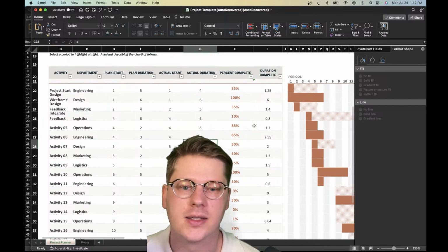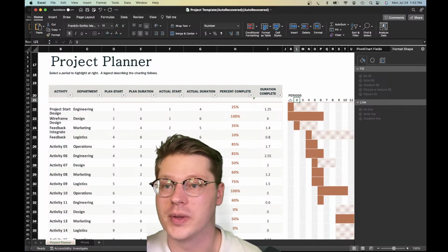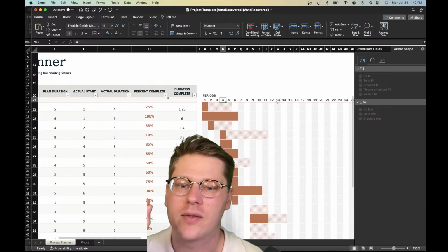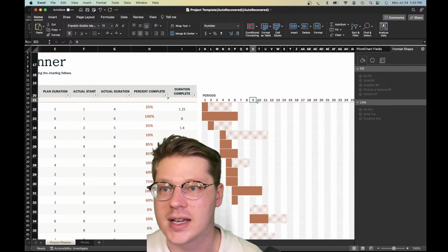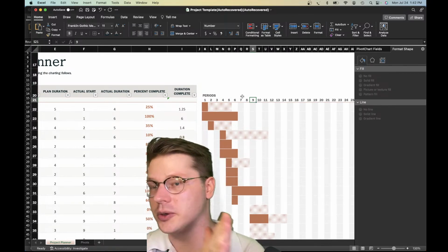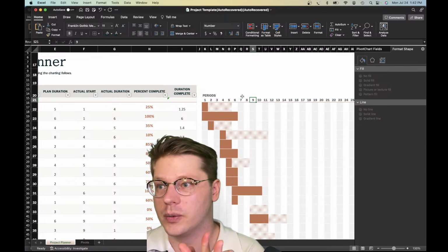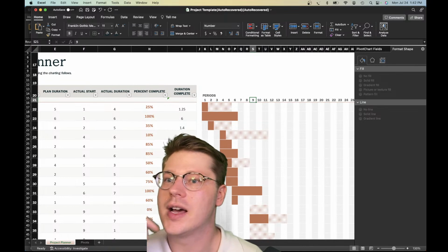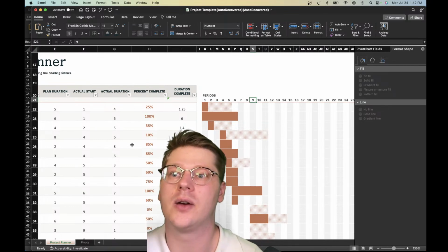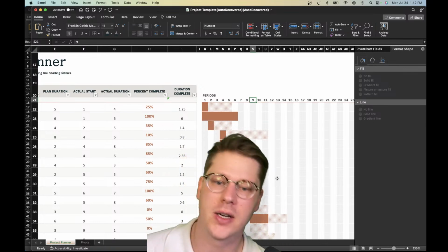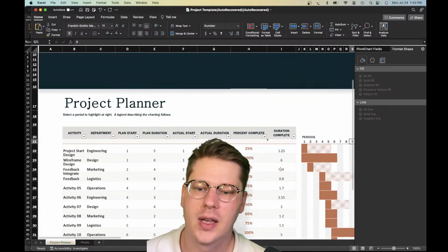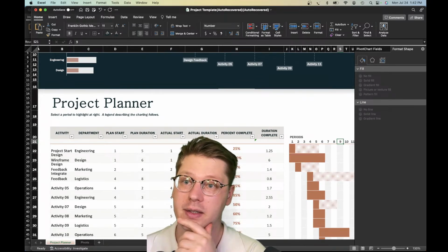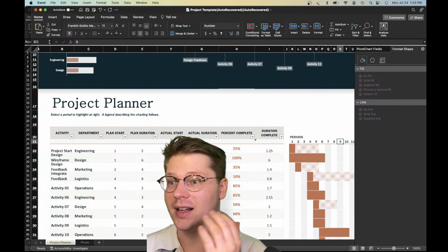The problem is this chart actually can't work with dates. And this is one of the issues with Gantt charts in Excel. We can't really have these periods be actual date periods tied into the chart. What they are is just sequential periods, starting whenever you want to whenever you want, but each one represents a certain period of time. So they're not actually the day itself, and if we use today, it wouldn't know where to put it in terms of the periods that are listed there. It's a little frustrating.